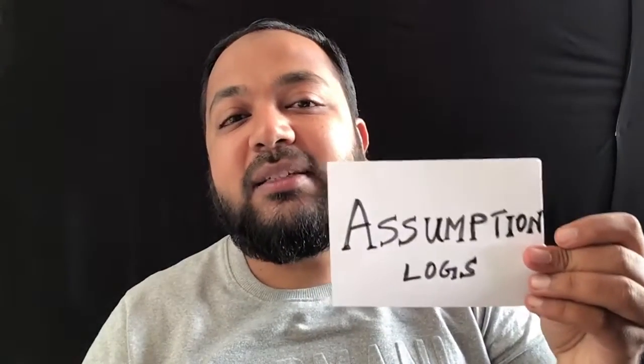Like there was one of our projects wherein we were using a particular search appliance, and the results were differing from the previous search appliance. And then we went and told the client, okay, this was what showed in the POC, and now the new search appliance is going to give us so many results, which is different from the previous expected results. But this is how the function is going to behave. So that will be a part of the assumptions log. Okay, so the assumptions log is also one document that will be updated throughout the project.